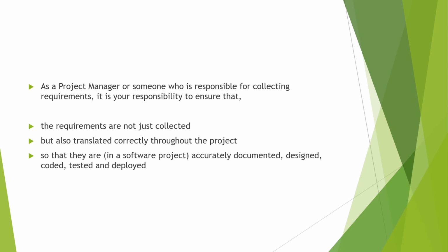Once the designers complete the design, it is the project manager's responsibility to ensure that the design is correctly translated into the coding, right? Once coding is done, as a project manager, you need to ensure that the testing is done correctly, accurately, and in a corresponding fashion with what the requirements were, right?